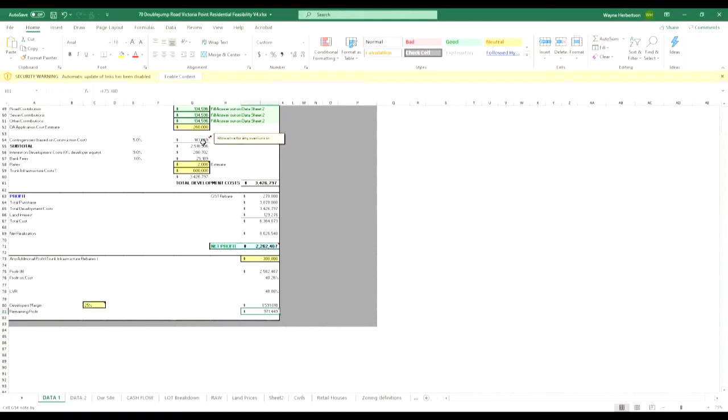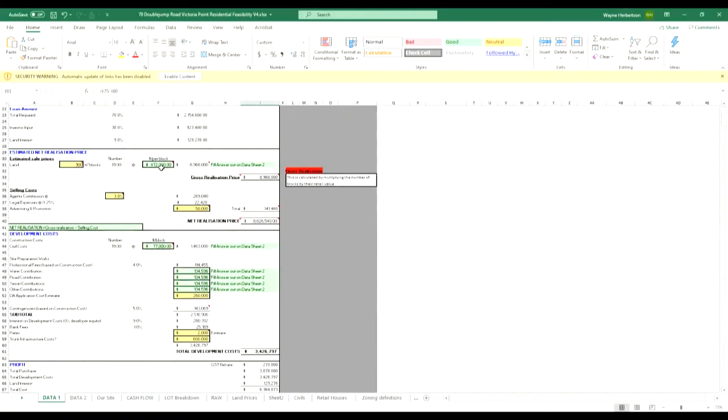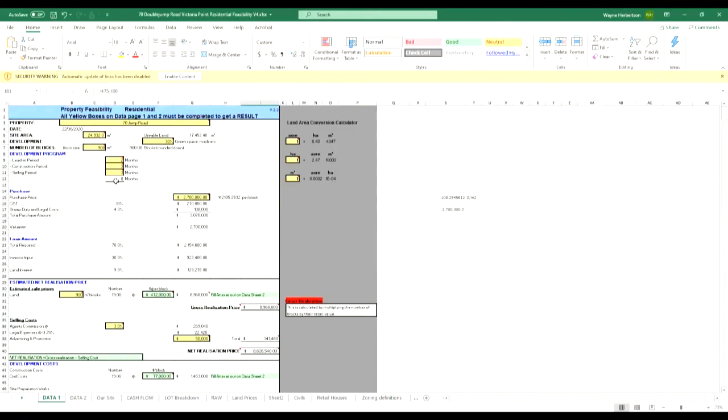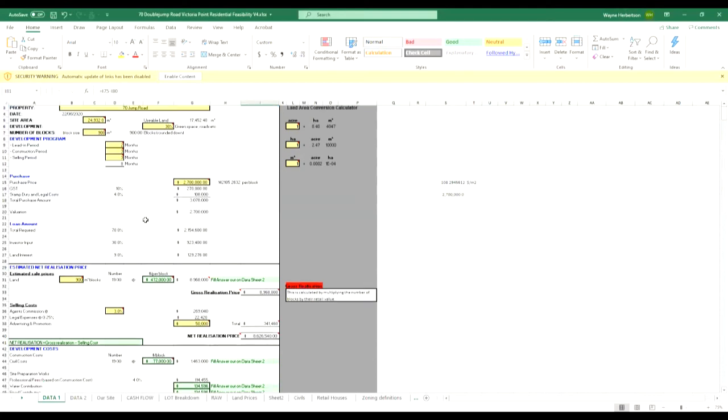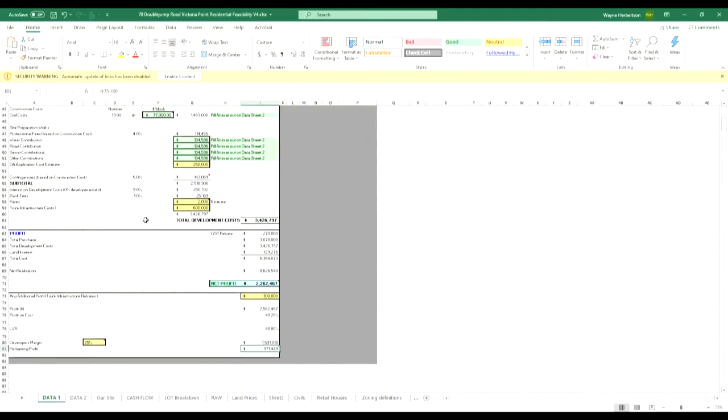If they stuff around and take longer than 8 months to build it, it'll cost them more money. So the big question for them is, do they think they can build 19 blocks in 8 months? And all the contractors we've talked to said they could easily build 19 blocks in 8 months.